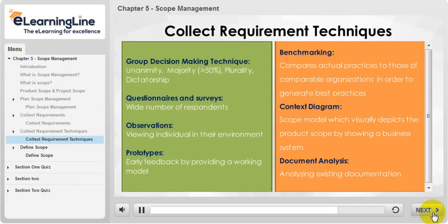You can have a multi-phased approach where a preliminary scope statement is prepared initially during the initiation phase. This also helps in getting sign-offs from the client at an early stage. After gathering all the information, a final scope statement can be developed during the planning process. A multi-phased approach is usually considered in larger and complex projects. In the next slide, we'll discuss more on this process.